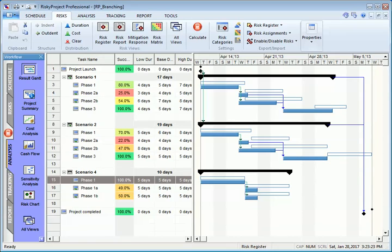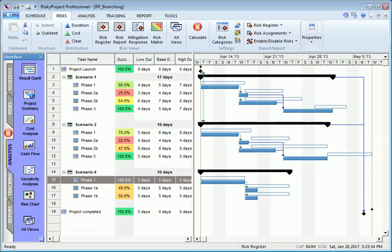Risky Project supports probabilistic and conditional branching. Probabilistic branching allows you to calculate expected values for the project in cases where you have not yet been able to determine which branch will be executed.